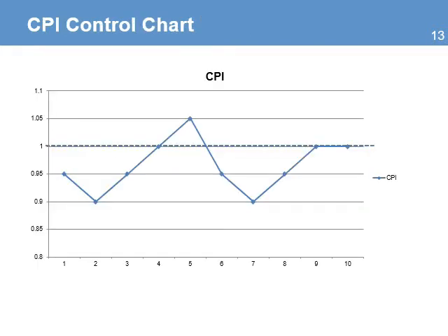CPI is an important value. You can graph its value over time. And if you can start making progress in each one of your reporting periods, you can use it to track how CPI is behaving and changing in the project. You can see the moments when the CPI is below 1. These are the situations that demand immediate attention. You need to investigate why the project is costing more than planned.